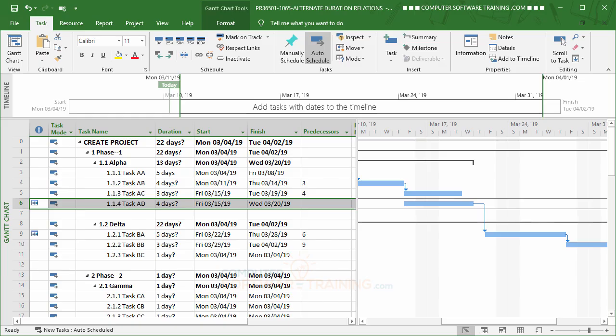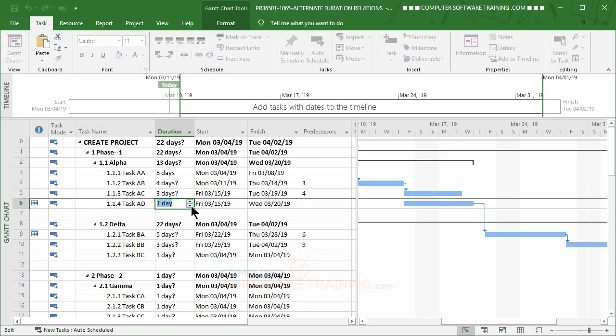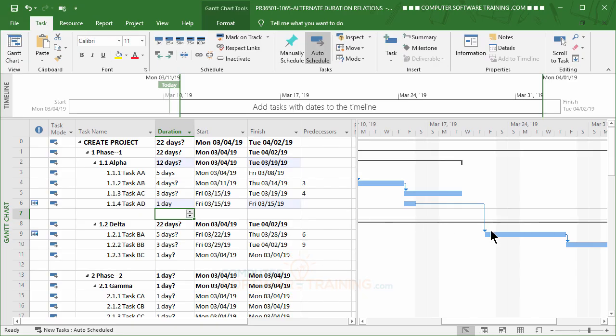And there we go. But still, the problem is that if later on I bring down the duration, let's say down to 1 day, it does that, see, because that thing got nailed in there. So that's a problem. We really don't want that. Maybe you do want to keep it like that, and if that's the case, then there you go, okay? But if you want it to be fluid, where they go back and forth depending on the previous durations and other kinds of relationships, then this is not a good thing.